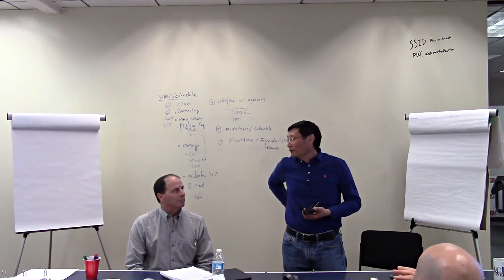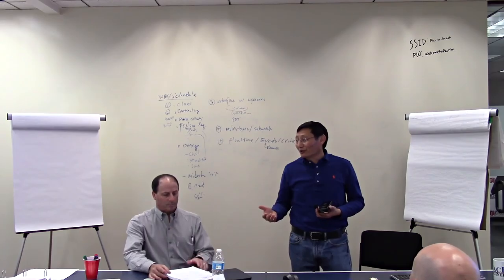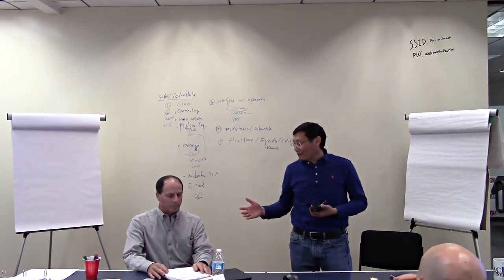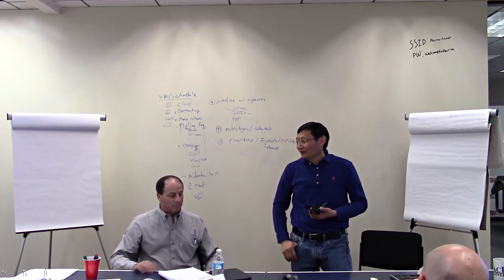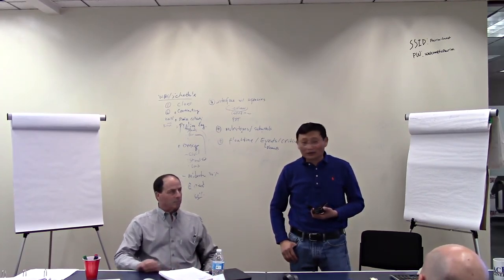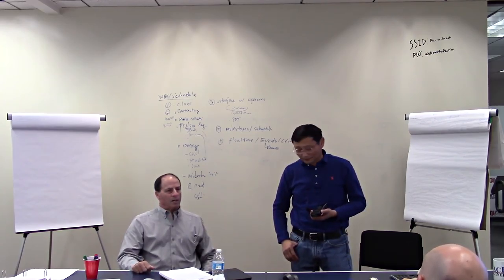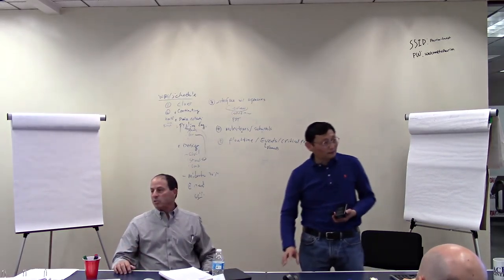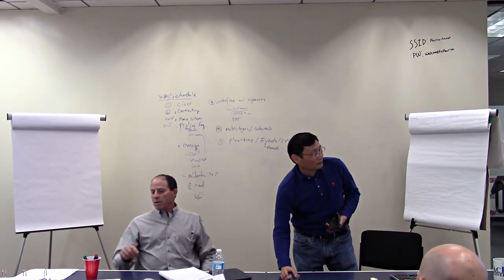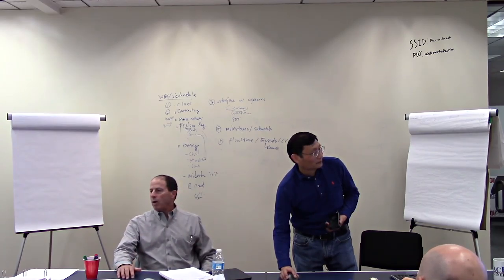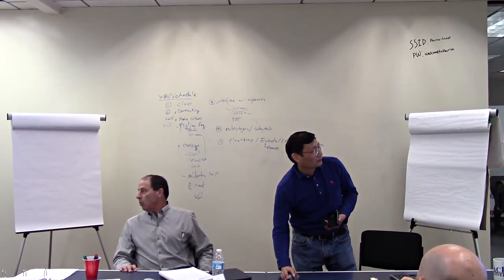Yeah. We don't get into this often, but sometimes we do, especially for NAVFAC, is that we have to re-scope the project in order to meet the budget. I think architects, they do that a lot. Public works tend to not. I haven't personally encountered a lot of cases where we've gone through 65% design, we realize our estimate is too much over the budget. I know architects, when they do a development, they encounter those things quite often.